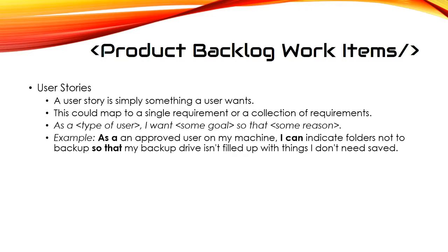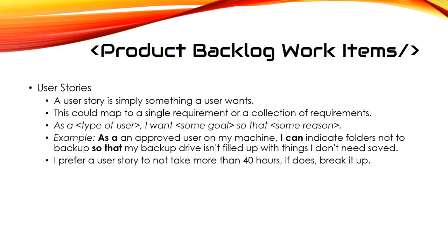So furthermore, if you take a look at this example, as an approved user on my machine, I can indicate folders not to back up so that my backup drive isn't filled up with things I don't need. So as long as you write your user stories with a certain type of idea, who's going to be doing it, what's the goal, what's the reason, then that work can be quantified. I prefer a user story to not take up more than 40 hours. If it does, then you need to break it up.